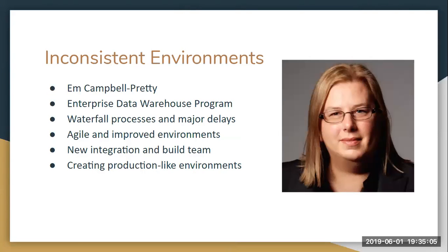M. Campbell Priddy worked for an Australian telecommunications company. She gained responsibility for all the strategic objectives for the company that relied on the company's enterprise data warehouse. The situation when she came to this post was grim. There were 10 streams of work in progress. Each stream used a waterfall process, and each stream was significantly behind schedule. It took a very long time for any of the streams to complete portions of work. When a portion was completed, the result often fell short of the expectations of the business.